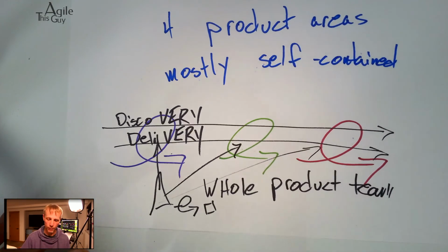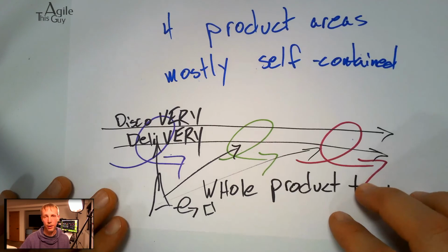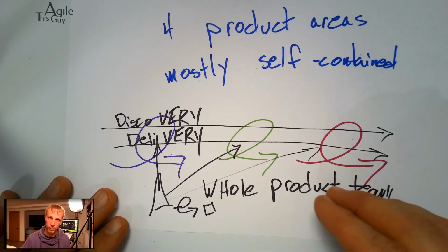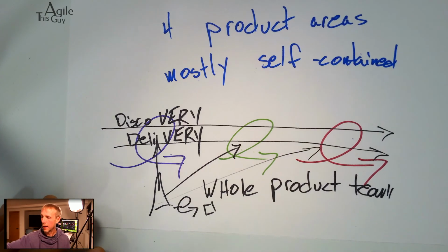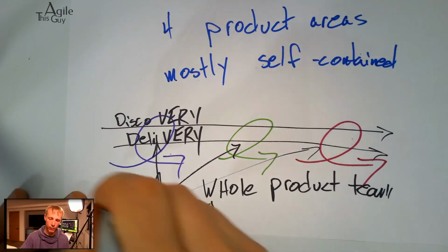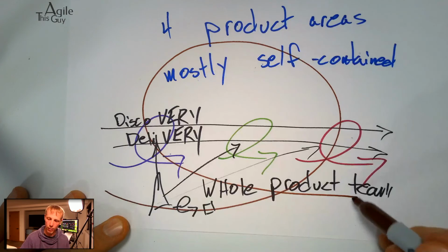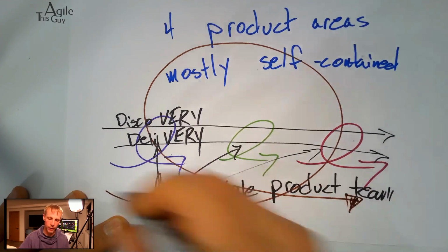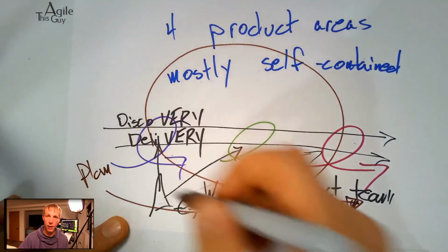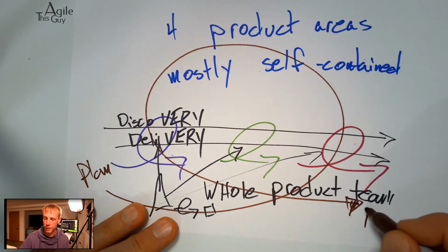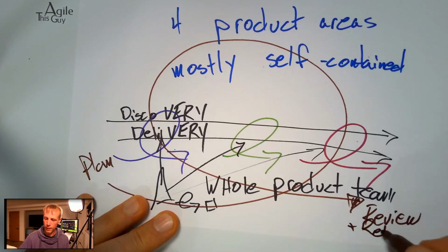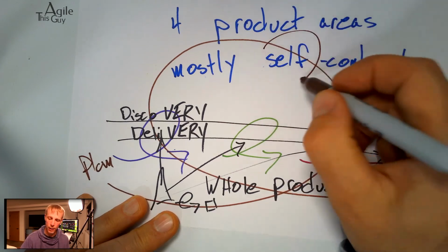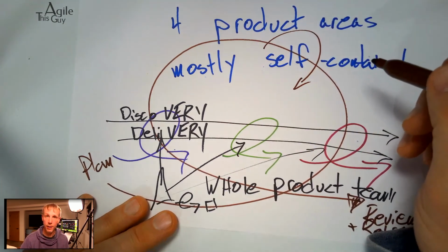And then what evolved around that was a coordination across all of this with things like big room planning to think through the next series of sprints. And so you start to see the evolution of really a bigger framework around all of this, with planning to start off with across these teams, the review and retro at the end of it, and then a meta stand-up on top of that.